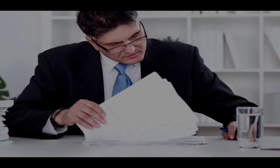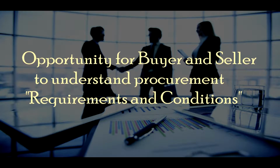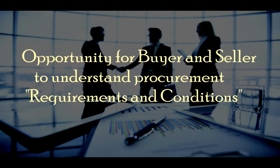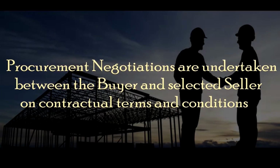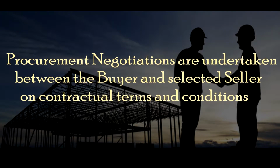For complex procurements, a bidders conference is a useful mechanism which provides an opportunity for a buyer and prospective sellers to understand procurement requirements and conditions. Usually, procurement negotiations are undertaken between the buyer and the selected seller on contractual terms and conditions.